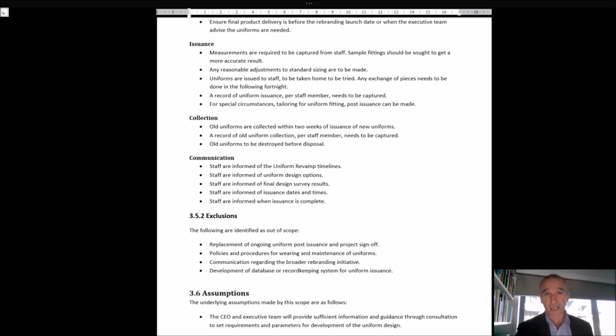This is the project scope management, where I go back to my sponsor and say, okay, you've asked for these changes. Here's the updated scope. Now I want you to sign off on that. And part of that updated scope is an extra 10 grand and an extra 2 weeks and an extra 3 people, 3 FTEs or something like that. And if you don't know, FTE, full-time equivalent.